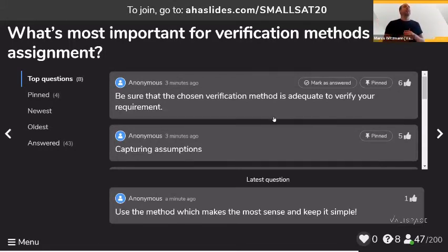Sounds nice. And then they come up with, oh, damn, probably part of this we actually need to analyze. Maybe it comes to propulsion, right? Some of it you can only show by measuring, and some of it you can only do calculations with to see if that fulfills the full requirement. So you'll find out, oh, now we actually need two different verification methods for the same thing.